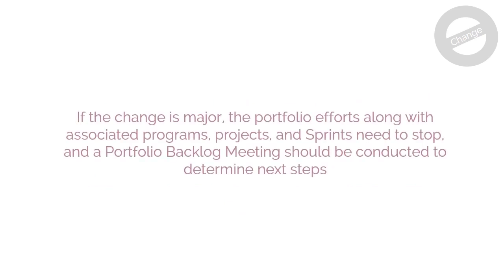If the change is major, the portfolio efforts, along with the associated programs, projects, and sprints need to stop, and a portfolio backlog meeting should be conducted to determine next steps.